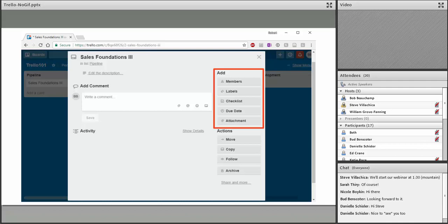And next you see there is due dates. You can add due dates to cards if you're using the calendar power-up, and we'll talk more about power-ups in a second. The card and the due date is going to automatically copy over to the Trello calendar feature. So any member who's been added to the card will receive a notification within 24 hours when it's due based on that due date you set there. Right? And the calendar icon is actually going to turn red when the card is past due to give you more visibility in your tasks.